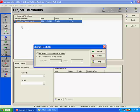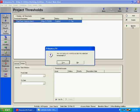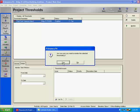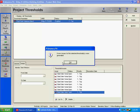Nevertheless, when I come into monitor thresholds, I can decide whether I want to use the dates in the original threshold monitor window or select new dates. So I can choose one of those options and then click monitor, and it would monitor all of my selected issues. But I'm just going to select monitor over here on the command bar, and I'll answer yes to the confirmation dialog box. And then you'll see I get a notification that eight new issues were generated for the selected threshold, which was start date variance. So I'll click OK.